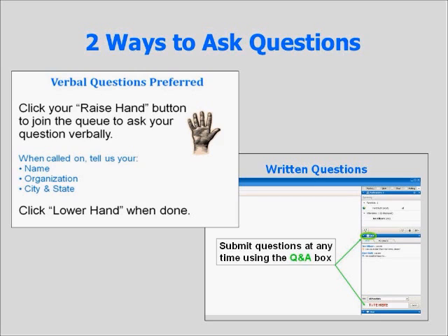Then there's the committed in terms of your funding and so forth. Obviously you can't commit yourself to a development agreement before you've cleared your environmental review and those sorts of things. But what I had in mind with that particular word is more that you have to know what your deal is before you can actually pin it down, before you can actually proceed. You can't make a financial commitment to the project and then figure out how it's going to work.